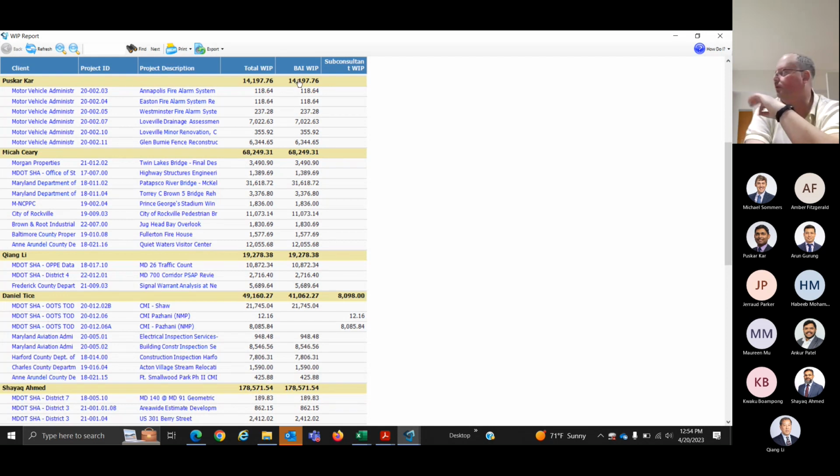and when you're doing your PM stuff, this is probably the easiest way to figure out if all of a sudden dud charges show up. Because if you see a job in there that no one's working on, that's when you can flag it before we get to the billing point. And it's probably the easiest place to grab. Just run this real quick, look down the list. Does that make sense? What jobs are open? If yes, then fine, you close it. You're like, okay, no one's charged anything overly stupid.